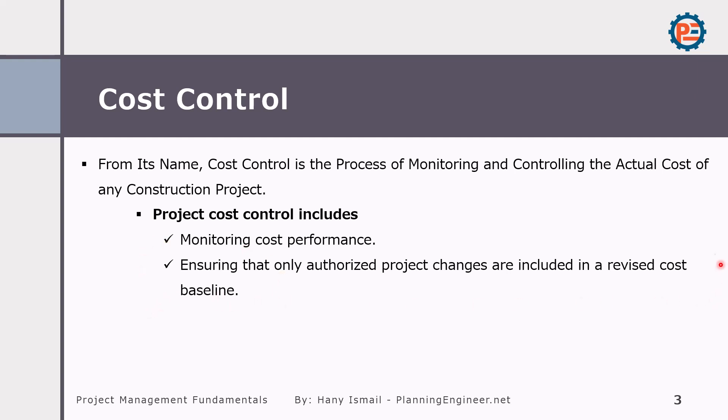Here you might find some project managers who are doing something called goal depleting — meaning giving to the client, from a contractor's point of view, more than the contract says. So if you are applying cost control, the project manager or whoever is responsible for the project cannot give more than what is already in the contract. Otherwise, we need to issue a change order for the contractor to execute additional works or even to change some specifications of the project.